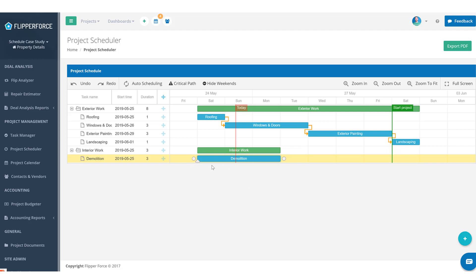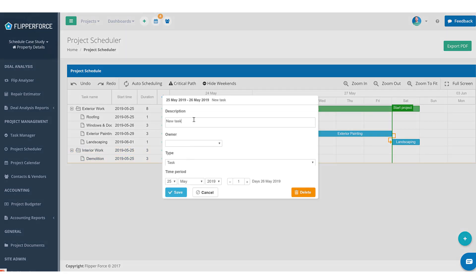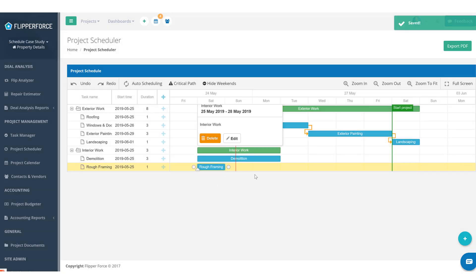After demolition, generally it's going to be rough framing. If you're tearing into walls, reframing, reconfiguring a bathroom, or tearing out a wall between your kitchen and living room, you'll have a little rough framing here. There's really not going to be a whole lot of work unless you're doing some really elaborate reconfiguration, so let's plug in one day for rough framing.